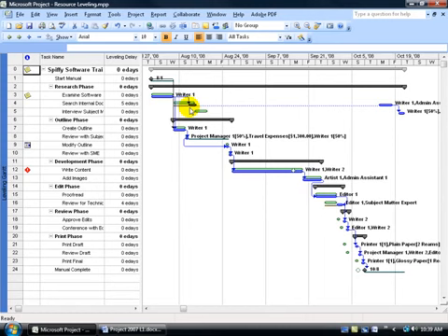And it did a couple of things. First of all, it delayed the task up to a certain point, and you can hover over that little gray line right here, and you should get a little pop-up that will tell you that it was 5 days delayed. Or you can come over here and look in the leveling delay, and you've got 5 E-days, or 5 elapsed days. So it went from this point, the starting point, went down to this point and delayed it by 5 days.